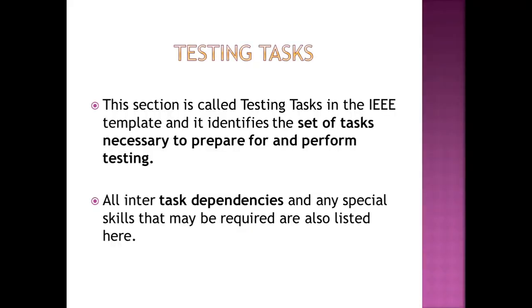Your testing tasks are the set of tasks that have to be in place before you start a particular process. For example, if you're going to start off with your test execution, your test case document should have been signed off. This kind of testing task, which has to be completed before you even start a process, has to be mentioned in your testing tasks. And your task dependencies, that is your entry and exit criteria for each testing process, should also be mentioned here.